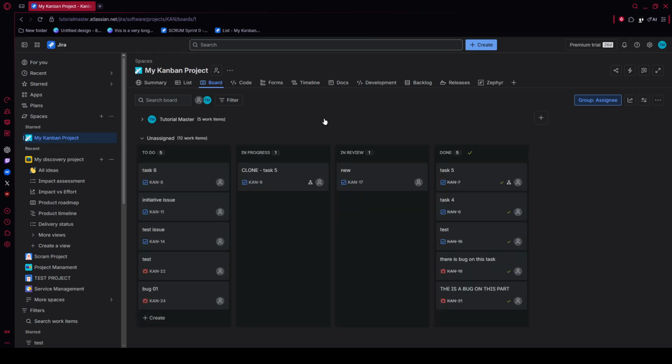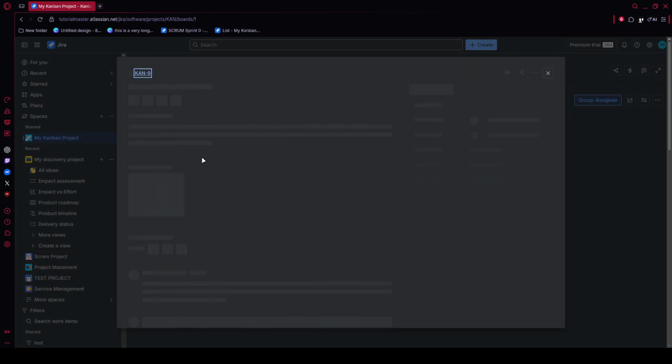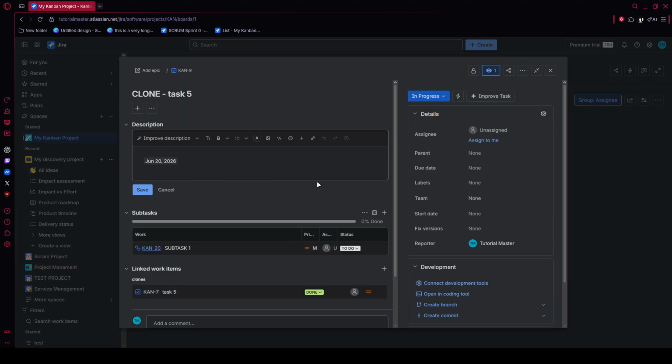Now set up the hierarchy so leadership can track strategic work at the right level. In the hierarchy settings, choose Initiative as your top-level view. Then create a new initiative with a short, clear title. After that, open the initiative details and link the relevant epics underneath it. This parent-child structure is what makes portfolio reporting much more useful, because it connects strategic goals directly to delivery work.